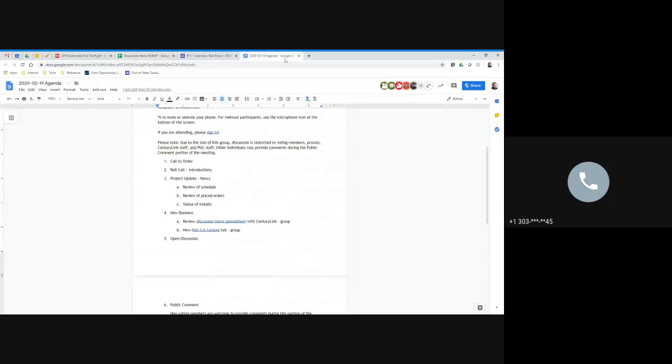Just one more aspect on that demarc that came as a surprise to Boulder County. Not knowing that make busy switch was going to come at the demarc, that would be something to definitely be aware of before you cut over. Right, and that's why I wanted to bring it up. I wanted to make sure that didn't come as a surprise to anybody else. And it can be moved. It's just a matter of who's moving it. We're not supposed to, for the agreement, go past our demarc on that stuff.